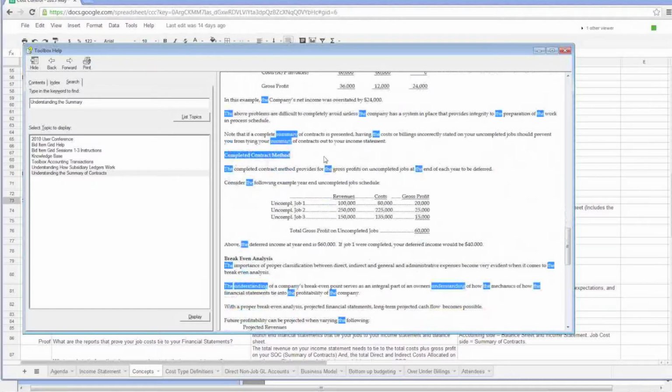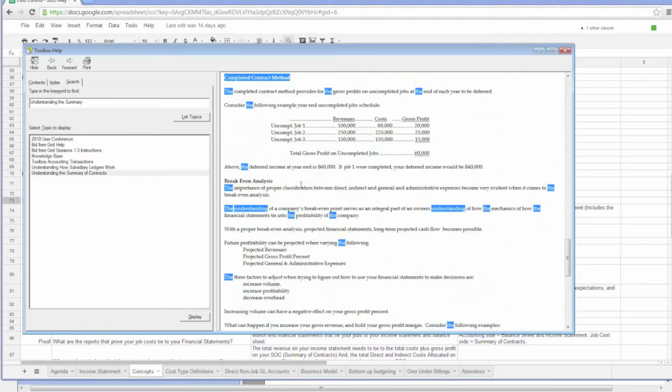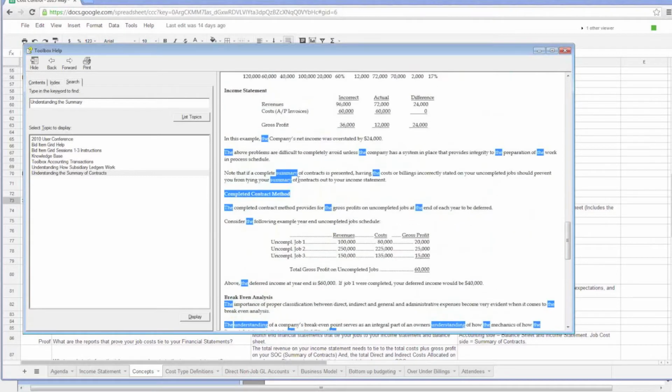There are different methods of accounting that you can interface with. For example, most of the contractors today that are closely held are probably cash basis taxpayers. There are a lot of completed contract basis taxpayers, which means they recognize the costs and revenues on a project when it closes or is close to completed, that kind of thing. Cash basis would be receivables in and out. There's something that we called the straight accrual method when I practiced in public accounting, and that would mean we're going to back off the over/under billings and just do it on the straight accrual method.